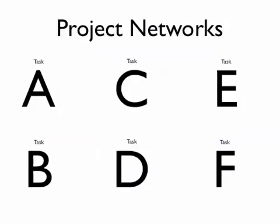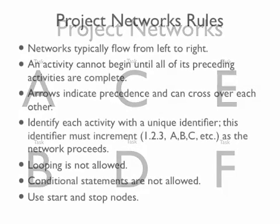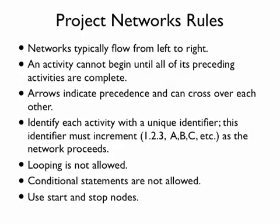To go from a list of tasks or work packages to an actual project network, there are a number of rules to follow. The network flows from left to right. An activity can't begin until all of its preceding activities are completed, and arrows indicate precedence. Each task is identified with a unique identifier that increments logically — for example, task 10 comes after task 1 and before task 20. Looping is not allowed, tasks cannot be repeated, conditional statements such as ifs and ors are not allowed, and we use start and stop nodes.